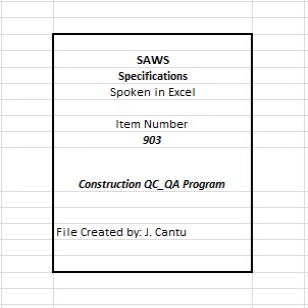3. Construction completion phase. Prepare written procedures with respect to issues including, but not limited to: A. Equipment training. B. Manufacturer's inspection/acceptance reports, as applicable. C. Deficiency punch lists. D. Removal of utilities, facilities, and controls plan and coordinate with proper personnel and/or agencies. E. Coordinate system operation turnover to owner. F. Complete all post-construction documentation/administration, as required by contract.